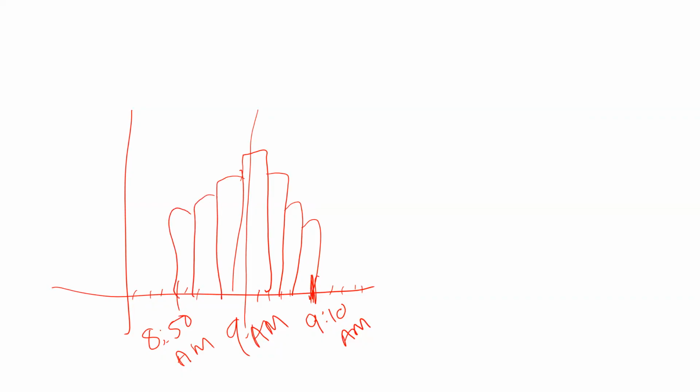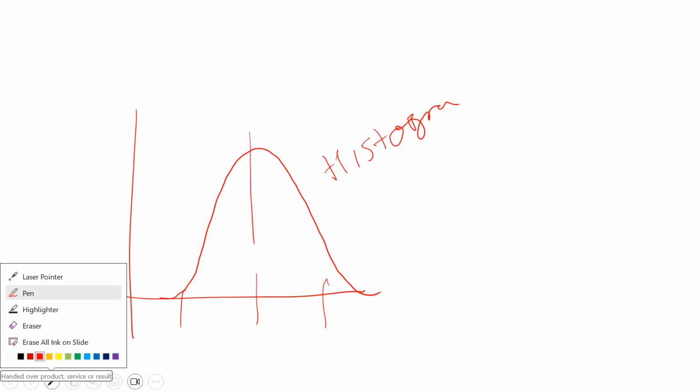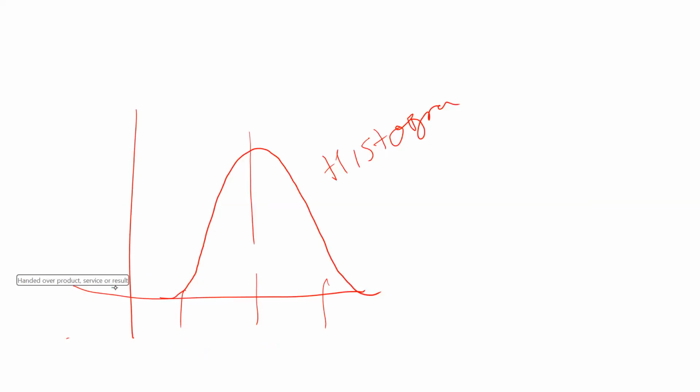Now this type of graph, if you do it on random data, will always come like this. This is the specification limit. This is a bell shape or sine wave, whatever you call it. If you draw it, it is called a histogram. The advantage of histogram is that when you are gathering this data, you might realize that in some situation, the histogram will start coming like this, which means your process is not very stable. Your process is widely spread. There are so many people coming too early and so many coming too late.